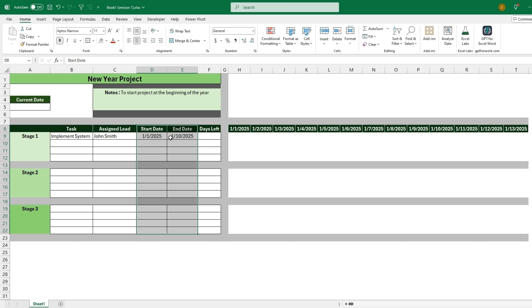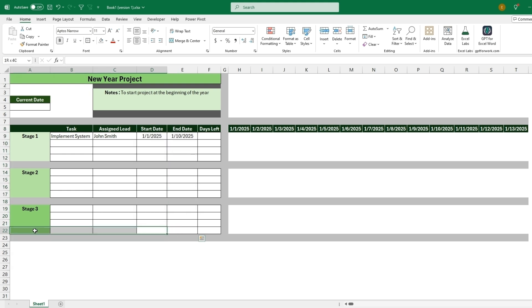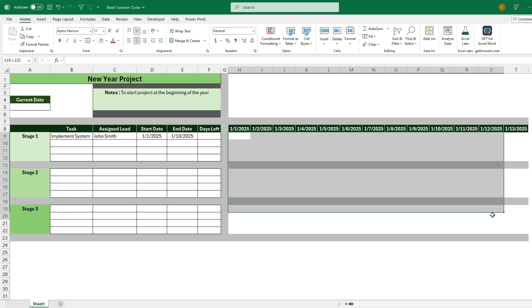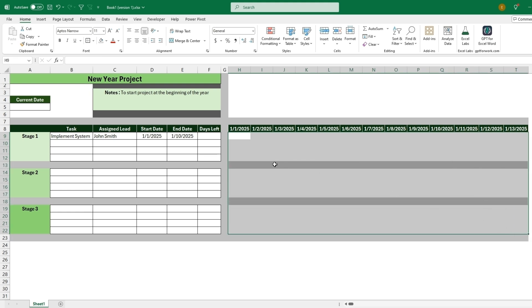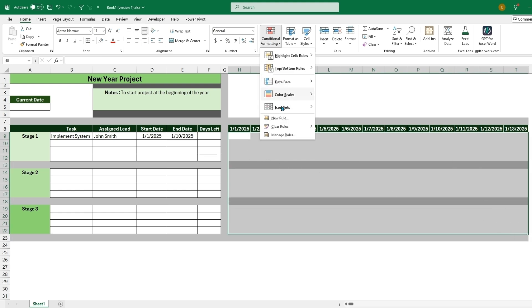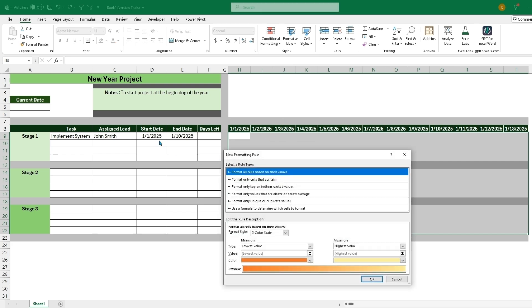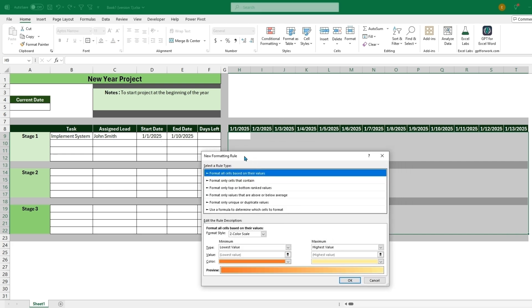I already have the first start and end date in here, but I know that if I fill in all of these start and end dates, it will go to row 22. And what we're going to want to do is create conditional formatting in these cells based on these dates right here. So we can just grab these cells right here and go into conditional formatting and create a rule that will color them differently based on the start date and the end date and the dates that we are tracking up here.